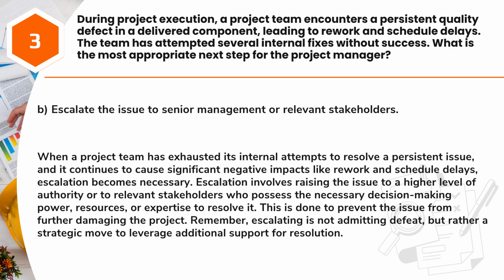Answer: B. Escalate the issue to senior management or relevant stakeholders. When a project team has exhausted its internal attempts to resolve a persistent issue, and it continues to cause significant negative impacts like rework and schedule delays, escalation becomes necessary.